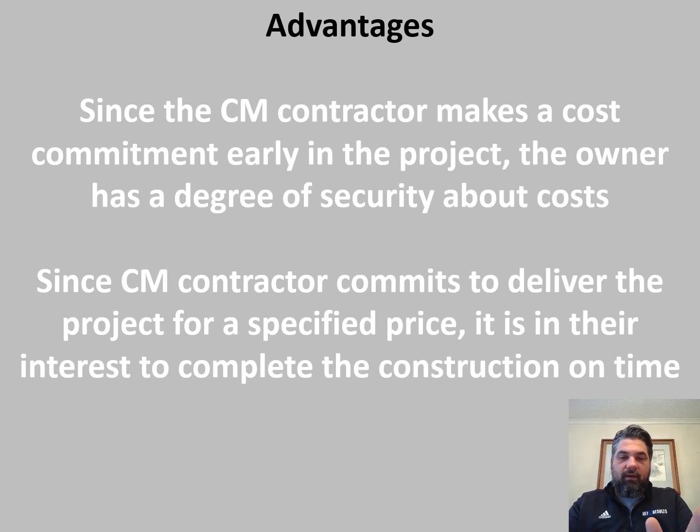And then there's the fee that they will propose that's typically negotiated beforehand for their overhead and profit. A lot of times you'll see the general conditions, what can be included in the general conditions, being defined beforehand as well, because that can make a difference on where the overhead and profit is being charged on the project.